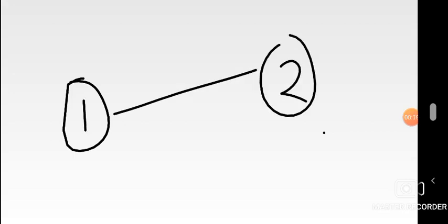I've noticed in the PERT video and the CPM videos that when we're drawing those nodes, like node 1 going to node 2, we have not been including arrows. It's a requirement in this networking process that when you're drawing a network from one node to another, arrows should be included. We just did not include them. It was just for quick calculations, but please, arrows have to be included to show the direction of where an event is going, and from that point to another. Just take note of this whenever you're drawing any networking model.